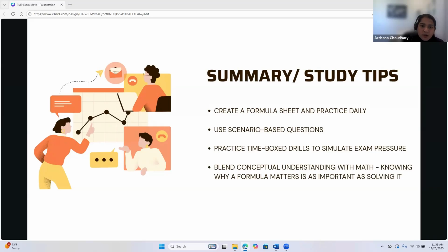Don't memorize. Use the logic, master these EVM logics. Instead of memorizing, lead with patterns and the core values like PV, planned value, EV, actual cost, and the formula of the index. If CPI is less than 1, it is over budget. SPI less than 1 means behind schedule.